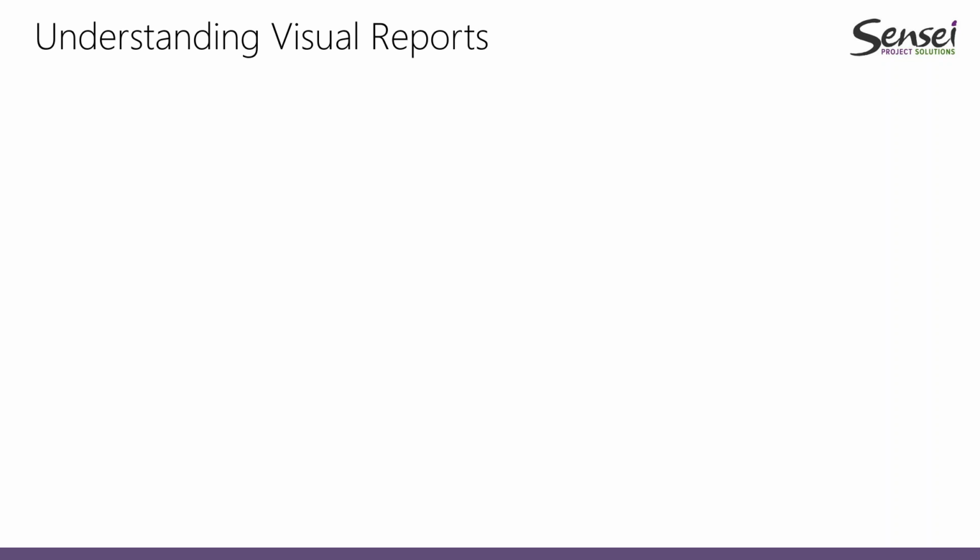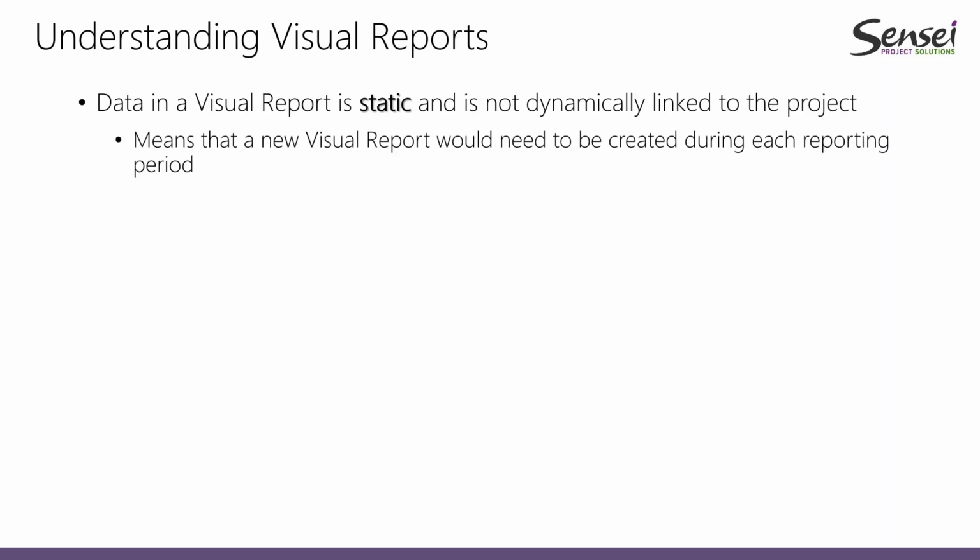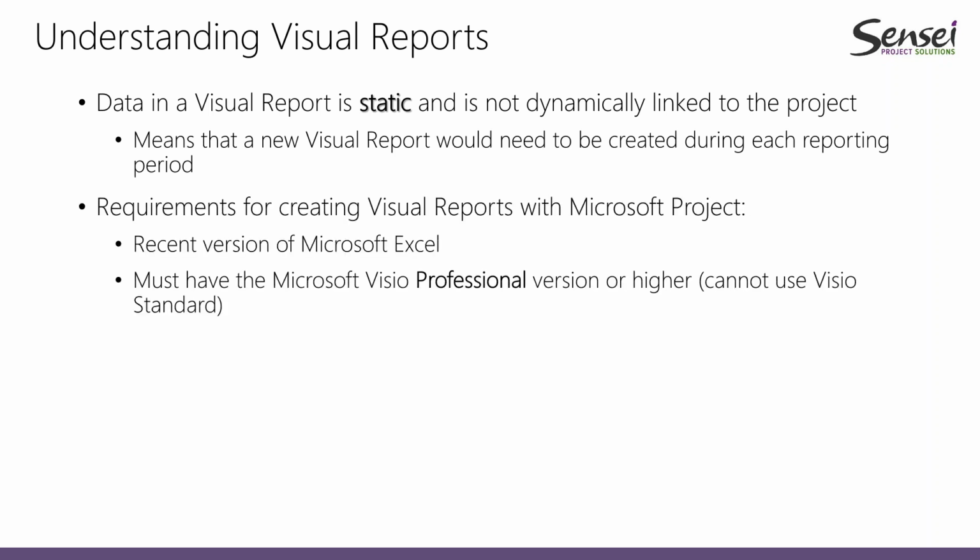One thing that I do not like that much about the visual reports is that they are static. Once they are created, there is no way for you to refresh them, which means that for people who are still using Project 2007 or Project 2010, you need to create reports basically every week. That's not something nice to say. However, I'm going to show you real quick how you can create a custom report that is in fact refreshable. You can refresh this report using the technique that I'm going to show you in a second.